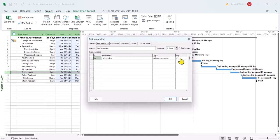And your lag and lead is in the far right column. Zero lag. They both get put in the same place. So a lag, if you're lagging behind, is a positive number. And a lead, if you're pulling ahead, is a negative number.